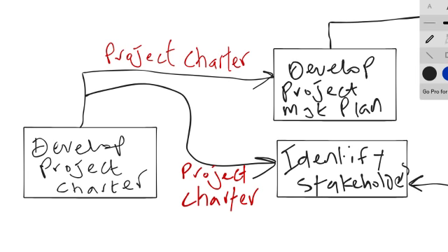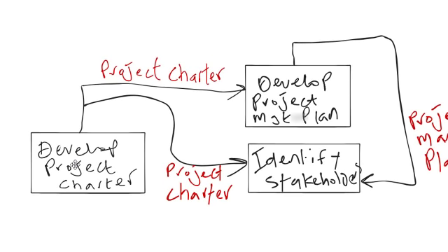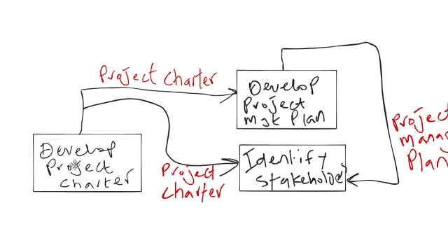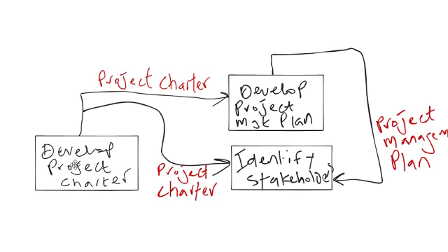It's never happened in the PMBOK Guide before, but PMI tells you that your project management plan, and I'll show you the larger landscape in a minute, the project management plan is an input to Identify Stakeholders. So this feedback loop going back into initiating is one that you do not want to miss.